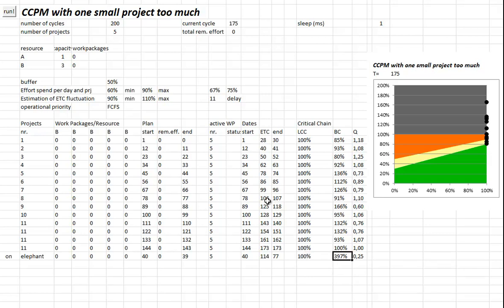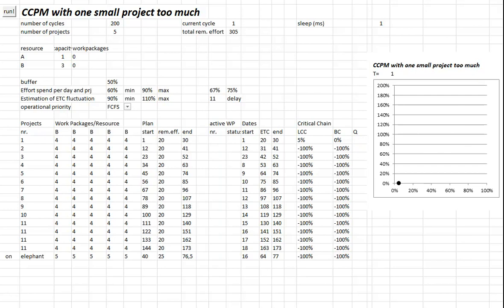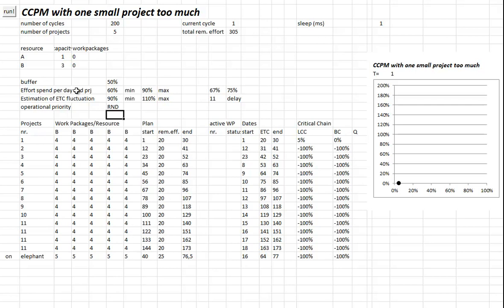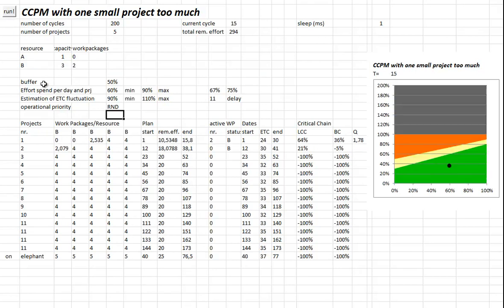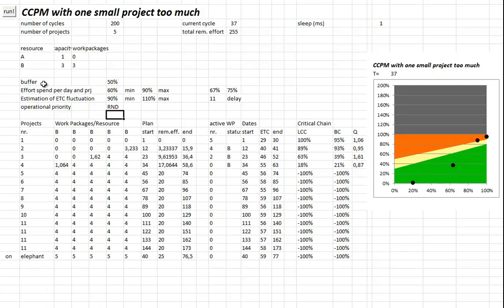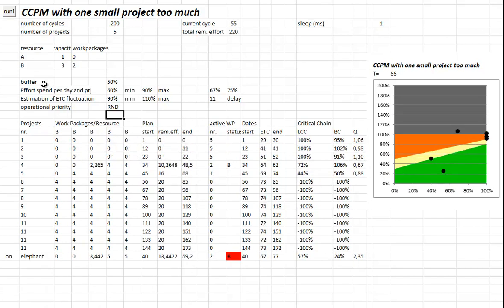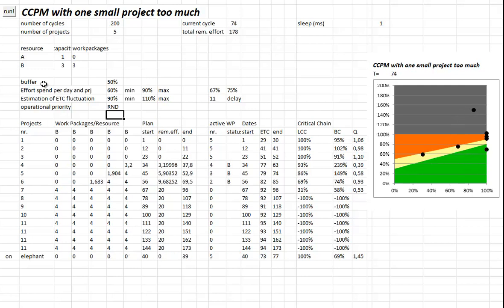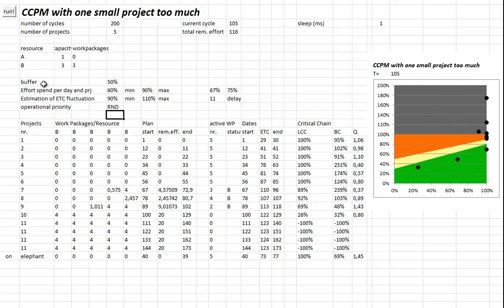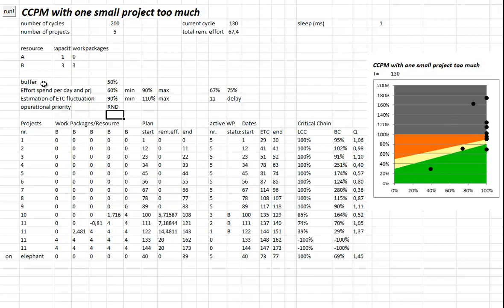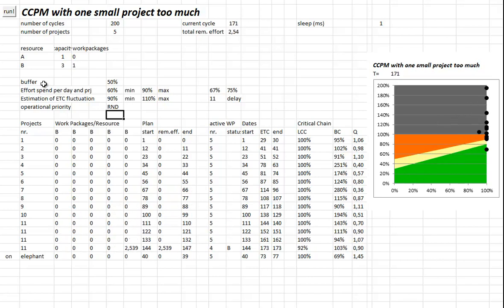There's another option: random priority. This is very often seen in companies, but random priority just means your projects suffer randomly. That's not so worse than just doing first come first serve. You see the projects are suffering - a few of them are really getting high, but after a while it goes back to normal. It's really more stochastic. You don't know which project suffers.